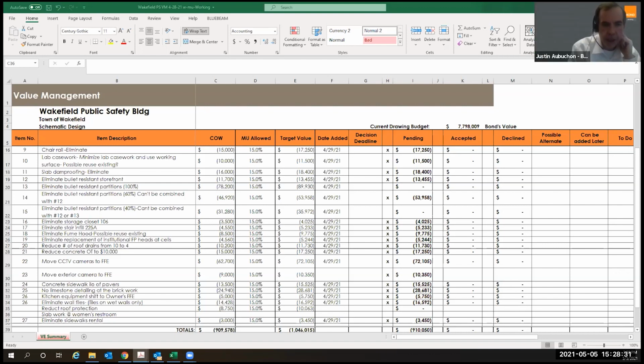I apologize, I was out of the loop on that discussion. Which bathroom was this in regards to? The women's locker room, right? Is that what we're talking about? Yeah, right now it's shown all the way on the north of the building, furthest away from any of the existing plumbing. So it was Greg's idea. He suggested that we mirror the locker room to bring the bathrooms back over to where the existing plumbing is, so we wouldn't have to rip up the slab on grade. Well, you'll still have to rip up the slab because it won't be tying into existing wet services, because you've got toilets, showers, everything in there. But it's less trenching through and restoration. Can we save 50% of that?